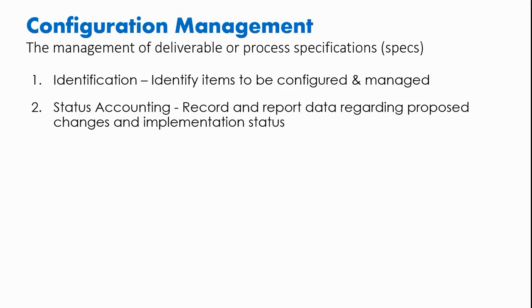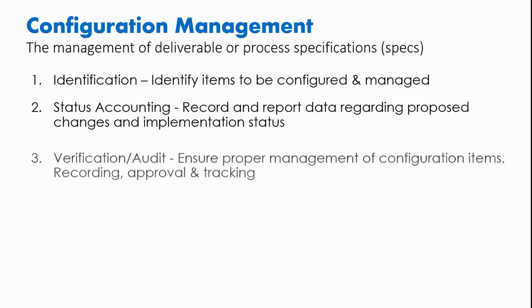So this is not involved with the management of change. In order to get this, you need to think about it as the management of specifications. So if the spec is going to change, you need to know it's going to change. You need to document that it's going to change. And then when it changes, you also need to have documentation that supports that change. You also need to report on a spec that has changed. So we call that configuration status accounting.